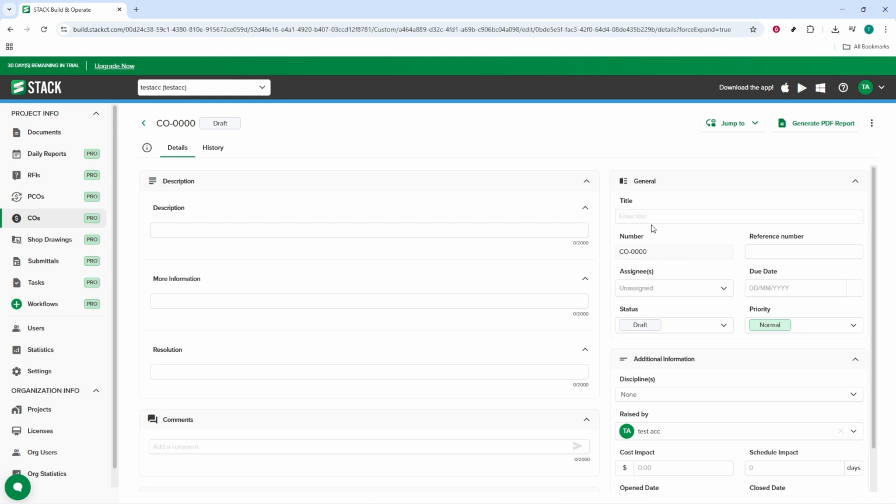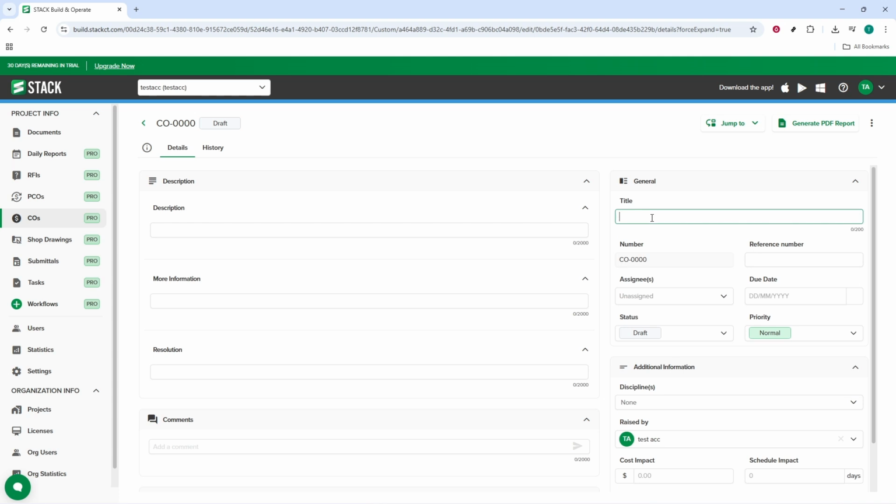Click Add Cost Code. You'll see fields for code, name, category or division, and description. In the code field, enter the identifier you've chosen, such as 0315 for a concrete slab. In the name field, write a clear title like concrete slab.